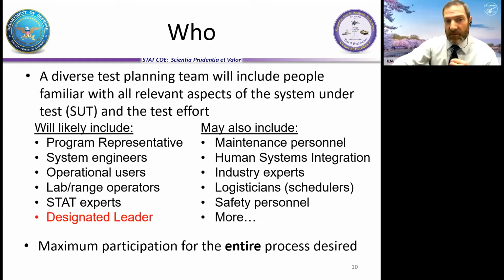Another lesson learned from me: maximum participation for the entire process. I learned this when I had a great systems engineer talk about how this system's going to be tested, and then we took a break and he never came back. We definitely could have used that input later on. But it wasn't communicated clearly in the beginning that we need everybody for that entire process.